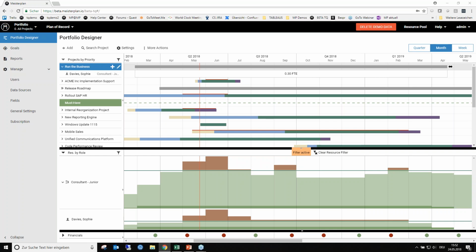What we do is we grant our agile teams 40% of run the business capacity, and the remaining 60% we divide into capacity available for minor changes, because we still want to be able to work on minor topics which just come in without us being really able to plan that.